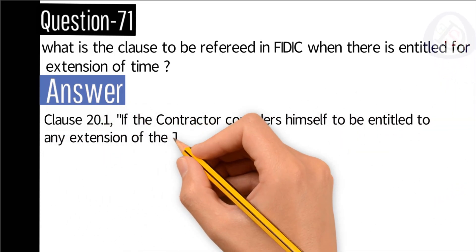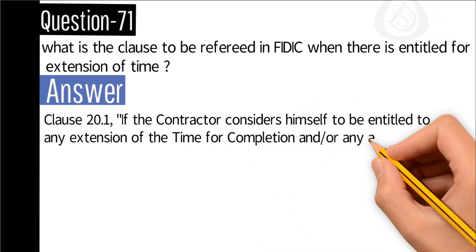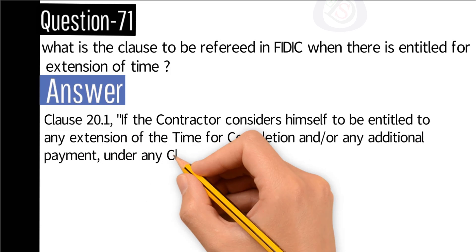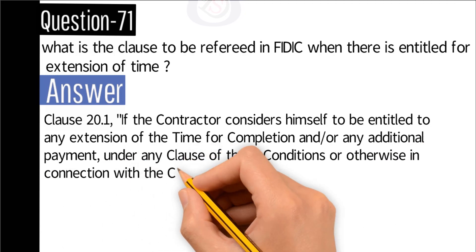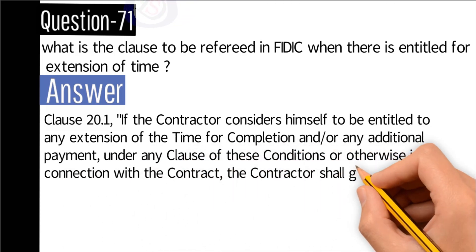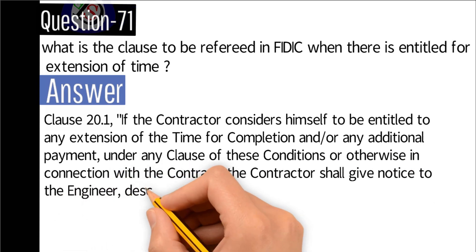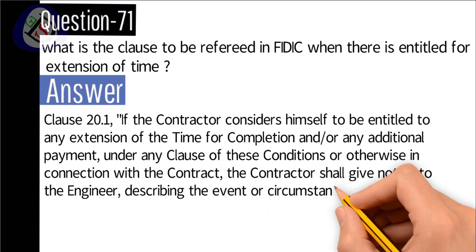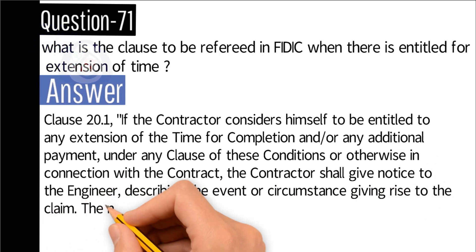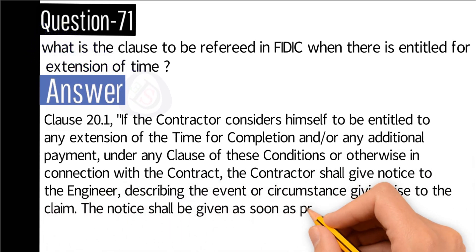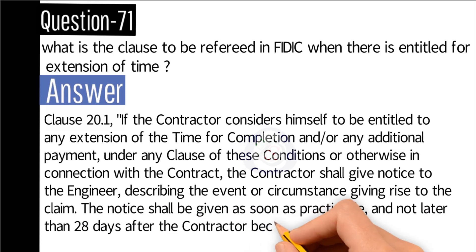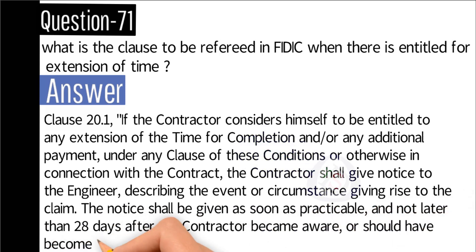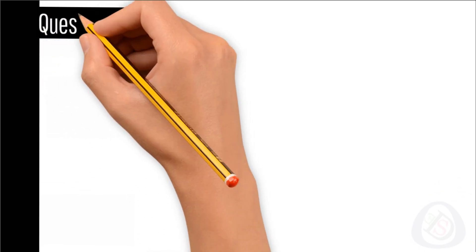Question number 71: What is the clause to be referred in FIDIC when there is entitlement for extension of time? Answer: Clause 20.1. If the contractor considers himself to be entitled to any extension of the time for completion and/or any additional payment under any clause of these conditions or otherwise in connection with the contract, the contractor shall give notice to the engineer describing the event or circumstance giving rise to the claim. The notice shall be given as soon as practicable and not later than 28 days after the contractor became aware or should have become aware of the event or circumstance.